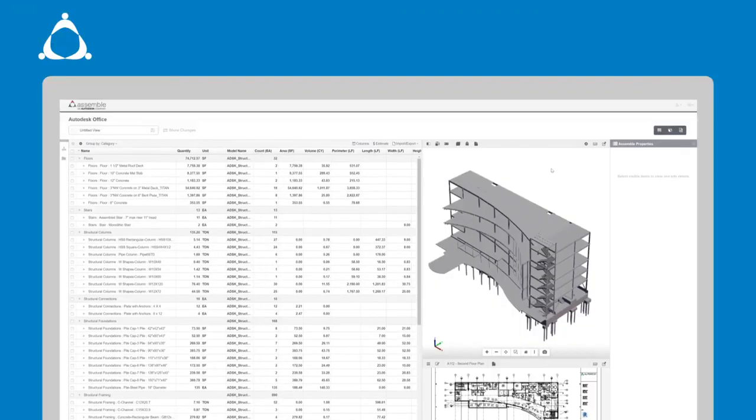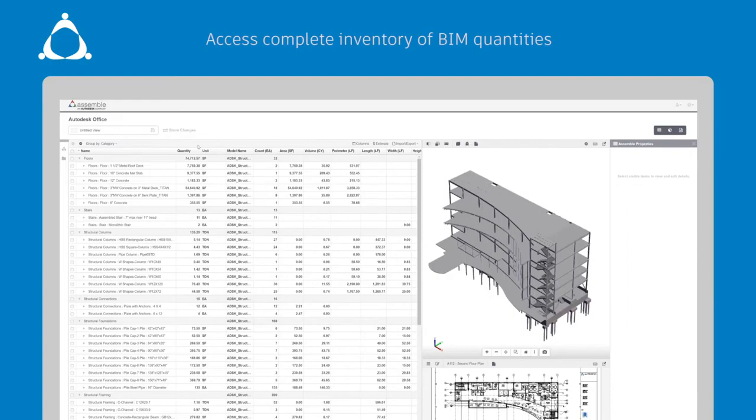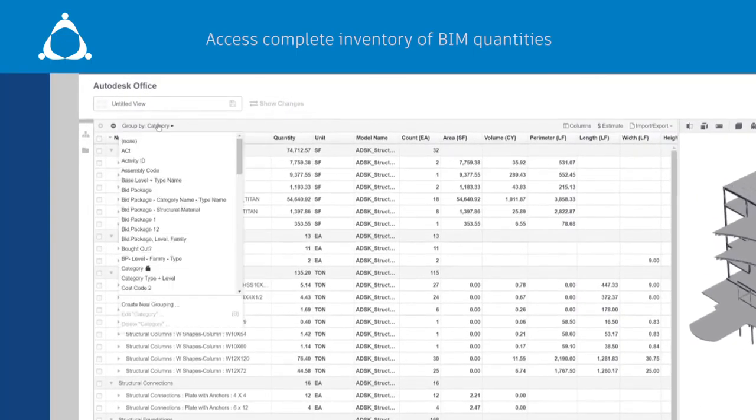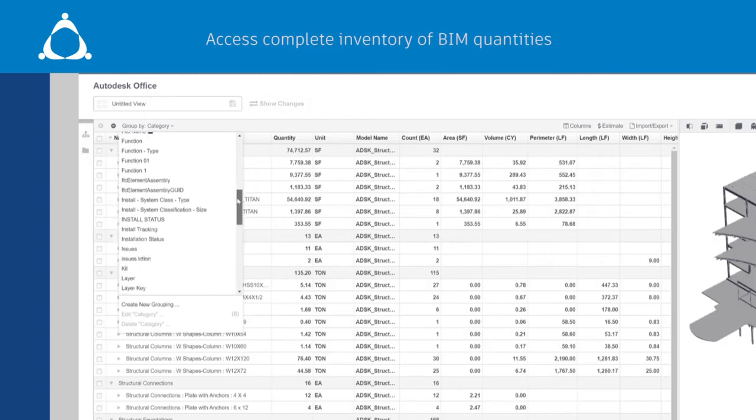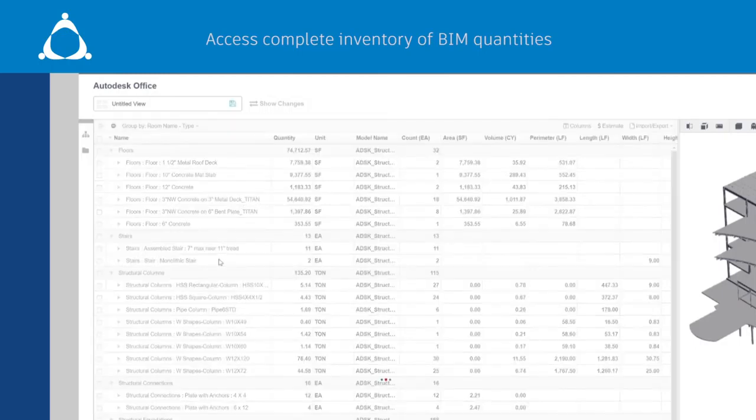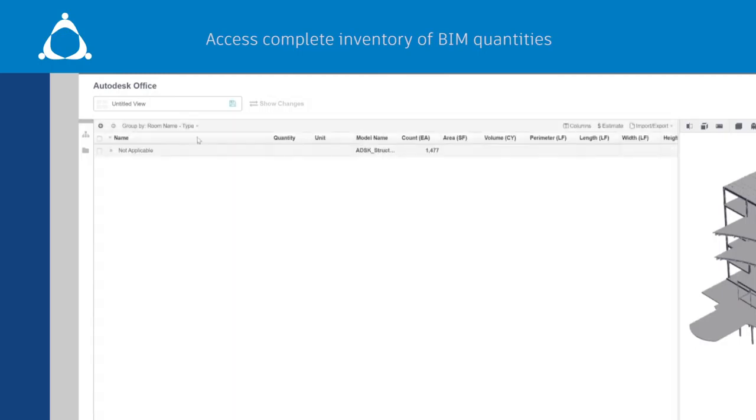With Assemble you have instant access to a complete inventory of BIM quantities. These quantities can be quickly grouped and organized by bid package, work breakdown structure, or even work activity code.